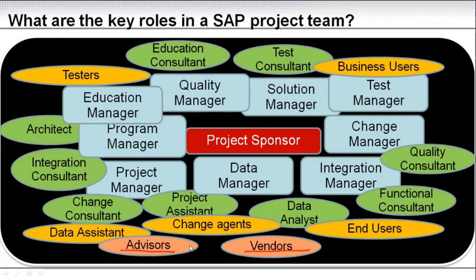Especially in large projects where you put all your faith in one big integration partner who will be the main vendor, you might have an independent advisor who joins in the selection of the vendor, but also later on the measurement of the performance of that vendor. So this is the full picture, a holistic view of the roles that you should expect to have, either as independent persons or integrated in your project team.